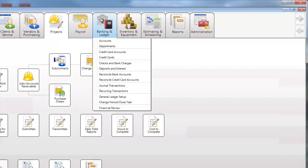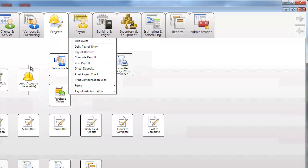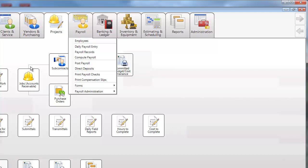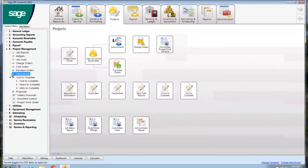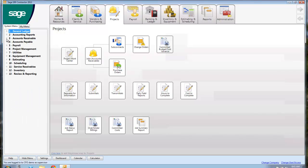That's really nice. And we do track all the vendor's insurance. I kind of call it, my saying is it's a three strikes rule. So if your subcontractor does not have a valid insurance policy on file or it's expired, when I go to create a subcontract, it's going to warn me. When I enter that invoice that he sends me in accounts payable, it's going to warn me again. And when I go write him a check, I have a choice of either A, warning me, or B, my favorite choice is just not printing the check. It will not even include that in the check processing. So you have a couple ways to track that and get warnings. And it will print out letters to them to let them know that it is expiring.